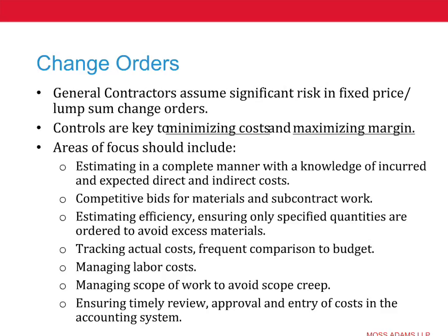So the contractors will come in and they went in with one set of assumptions, and now they're working under a different set of assumptions, because they find out what actually needs to be done because they actually have to build the project. And so in those situations, it's critical for you to immediately raise a red flag and start identifying the things that Jeff's talking about. So I just wanted to point that out, that's where a lot of opportunities are missed, is just at the beginning, just identifying it.